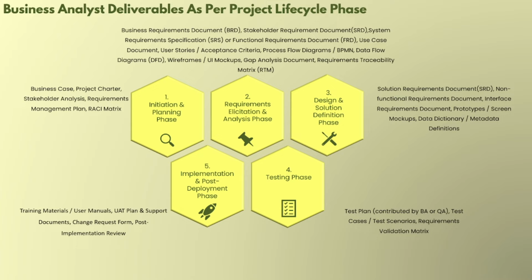In short, it defines the approach, roles, and schedule for business users to test the system and validate that the solution meets real world needs. And one of the most important is the change request form. During the project, and we are specifically talking about waterfall, if any change request comes in between, then we need to maintain this document very well, because it affects the cost and the time of the project.